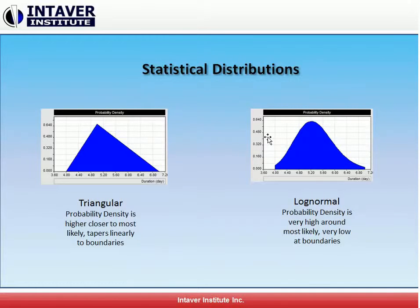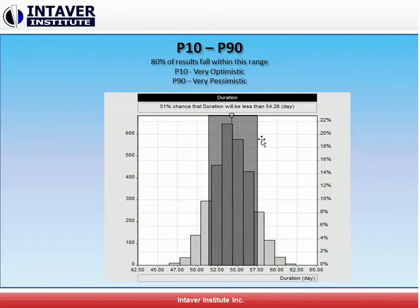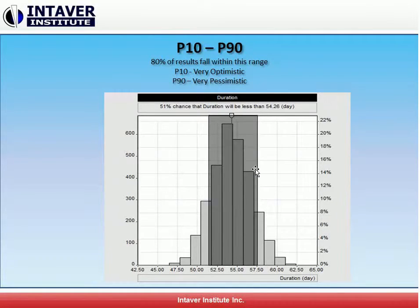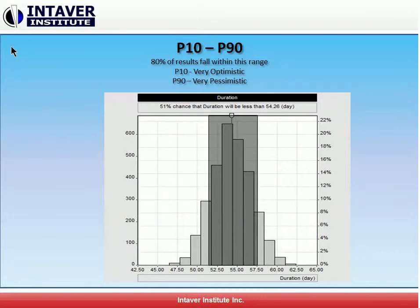After running the Monte Carlo simulations, we can analyze the outputs, typically using P10 as our low or very optimistic duration, and mean as our base, and anywhere from P70 to P90 as our high or pessimistic result. The relative difference between the low and high results is a measure of how likely the results will vary from the mean. This is known as standard deviation and is a measure of risk.